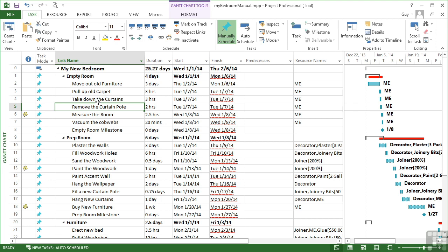And what I want to achieve is to change all these tasks into auto-scheduled and then link them all together. To start with in a linear way, so that we go from top left to bottom right, and then potentially visit some of those relationships to change them slightly. Now that could be quite an onerous task, but if I were to achieve that and carry it out once and record that, I could save that as quite a useful macro. A macro for resetting a project, for example.